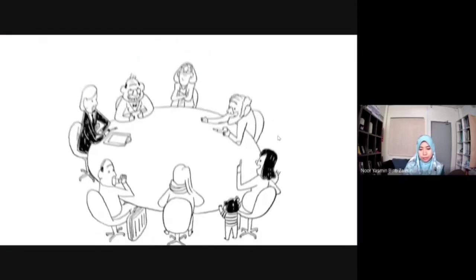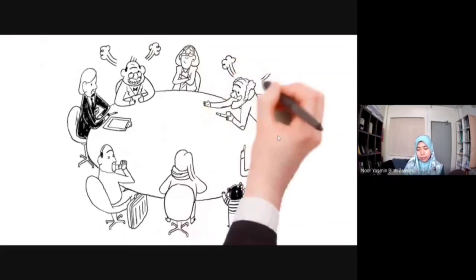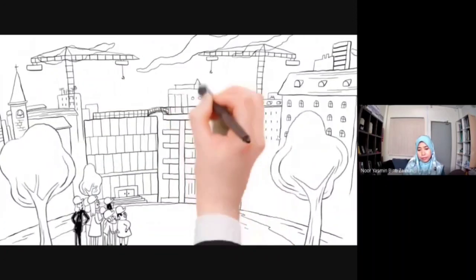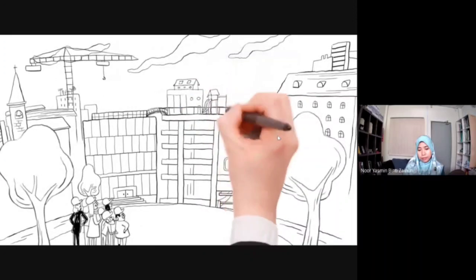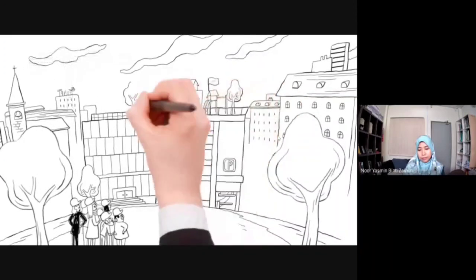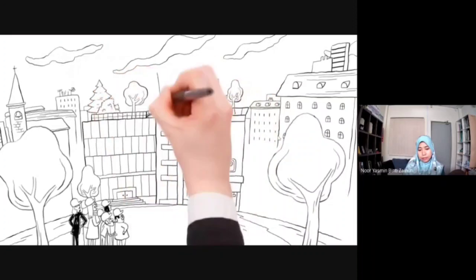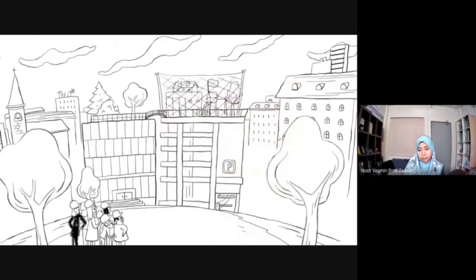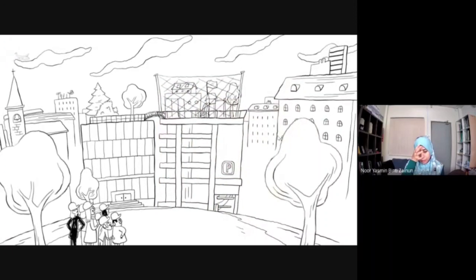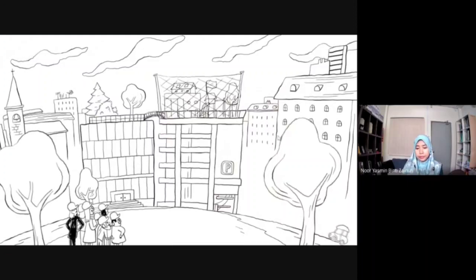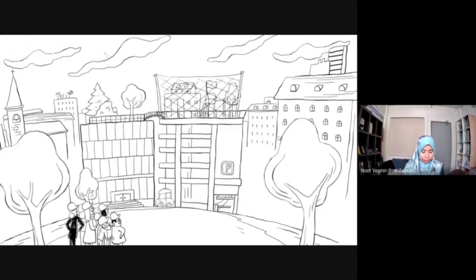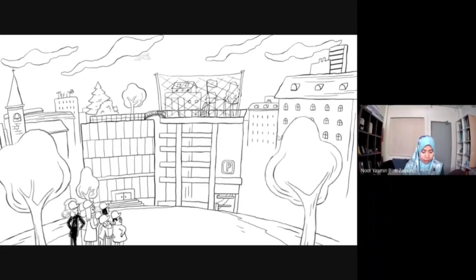Following intensive discussion, the team is pleased to come up with this new solution. A single-story building will be built on the car park, which is hardly used, and climbing frames, raised flower beds, and sandboxes on the town hall site next door. A large net will be stretched over the location for safety. An optimal solution for all involved. Since the property already belongs to the town and does not have to be purchased, building stays within budget. Work can start at once and will cause hardly any disturbance. The result provides sufficient daycare places right in the town center and is still good for loading and unloading.